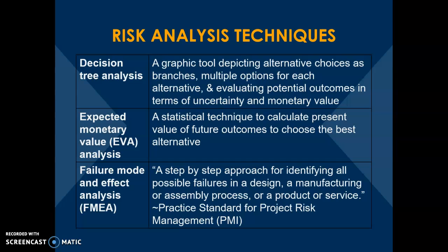A second type of quantitative analysis would be an expected monetary value analysis, or EMV analysis. This is a statistical analysis of calculating the present value of future outcomes. So essentially it's looking at financial returns on an investment or project, looking at the time value of money, something that we get into quite a bit in engineering economics, but this would be along those lines of calculating present value of a future investment.